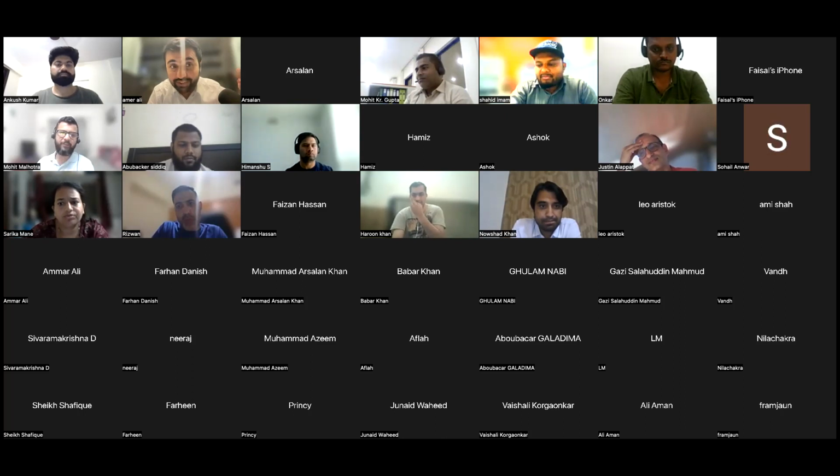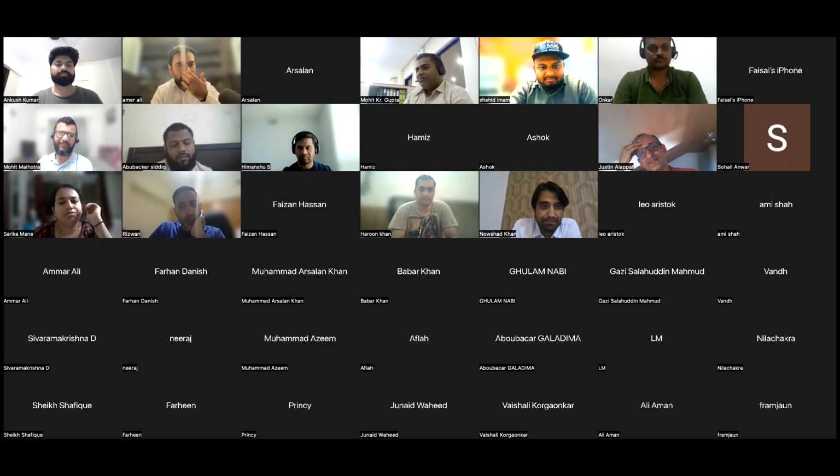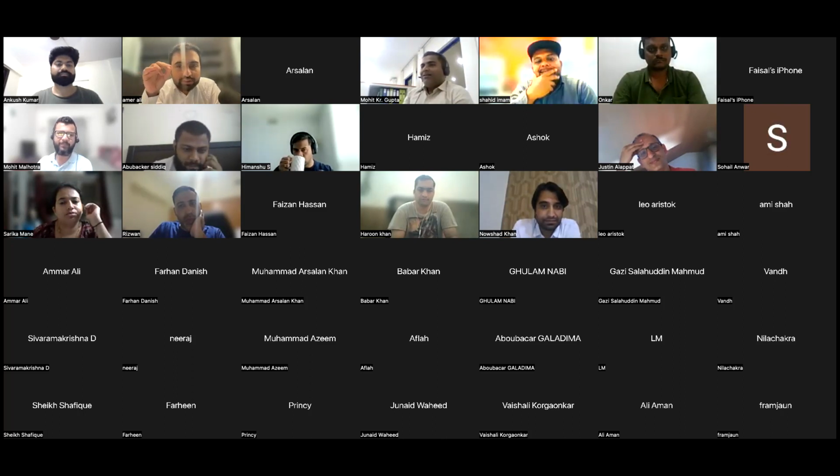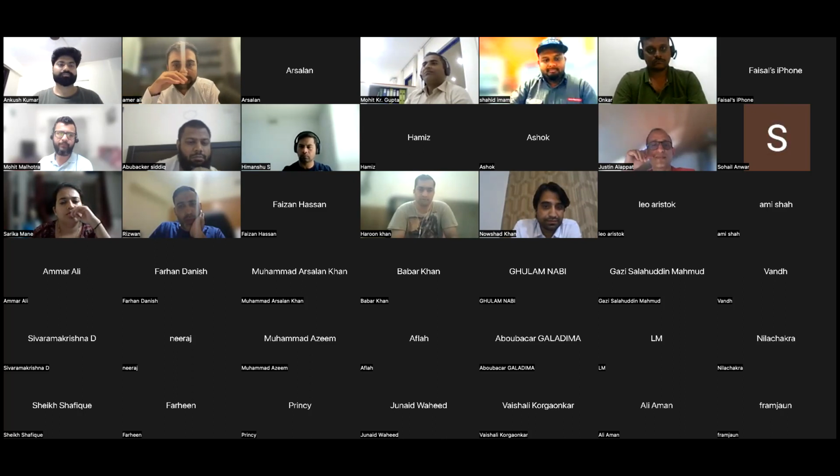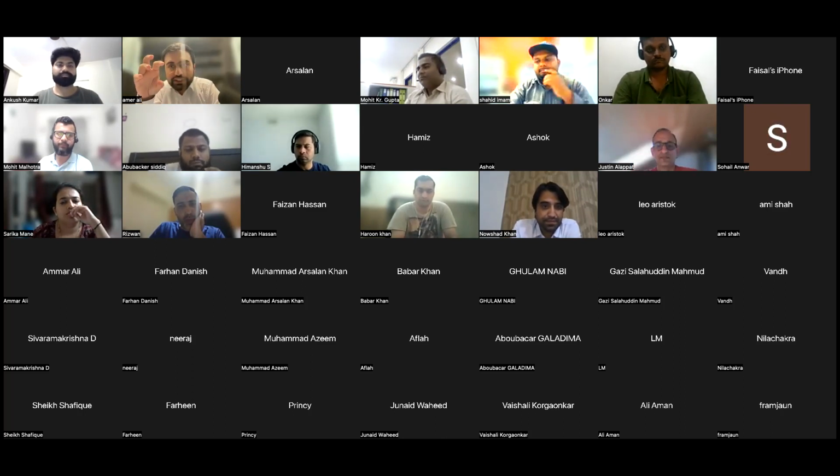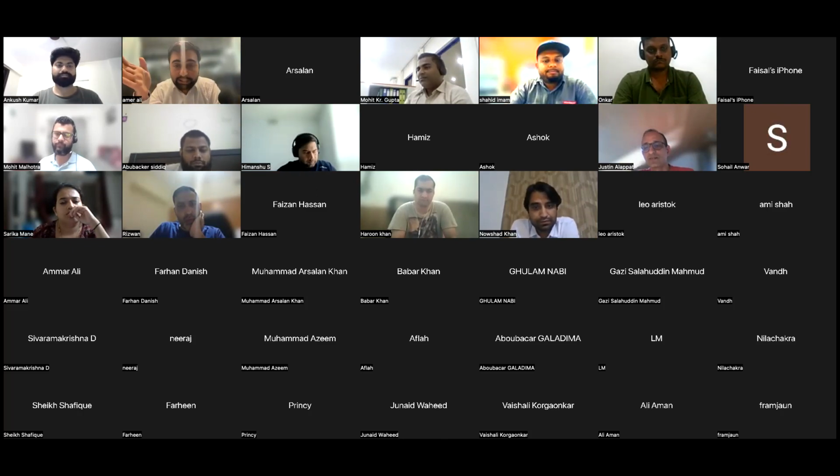So you were not listening. No, stakeholder register, right? Yes, we put them into the stakeholder register. Then we make a stakeholder engagement matrix, which looks at the current engagement of the stakeholder and our desired engagement, and we make a stakeholder engagement plan.